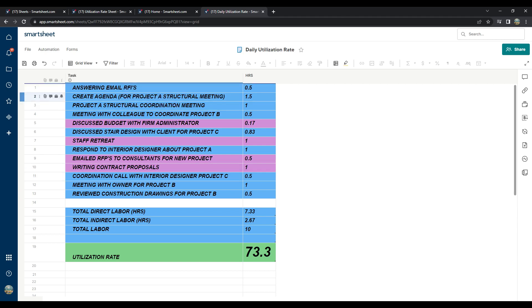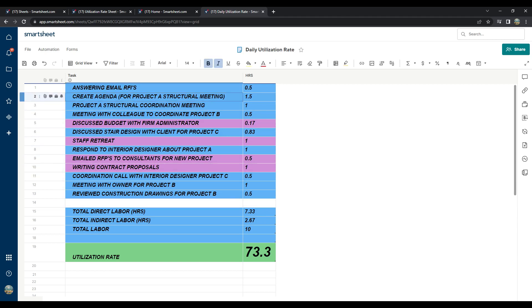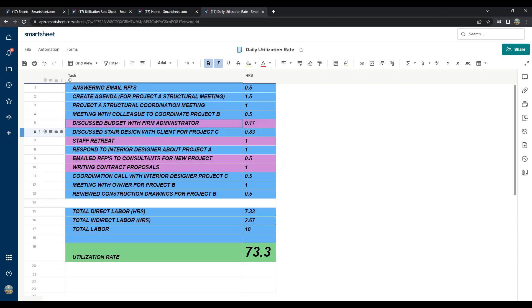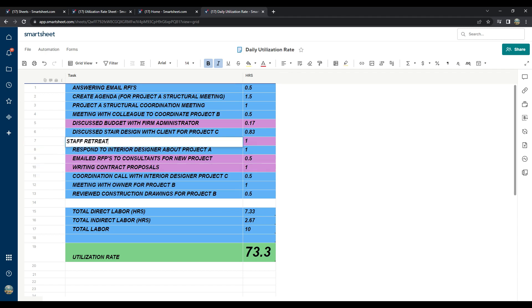For each task, ask yourself, would this be a billable or a non-billable task? Remember, anything project related, like where I created the agenda for a project structural meeting or discuss the stair design with a client is billable because it's related to an active project. Other tasks like the staff retreat was specifically charged to a general overhead account. So that was non-billable.